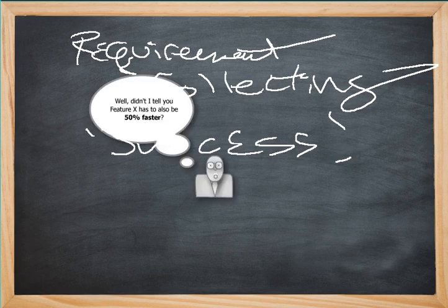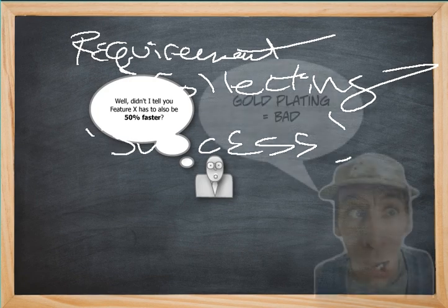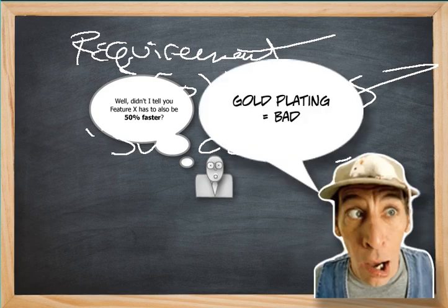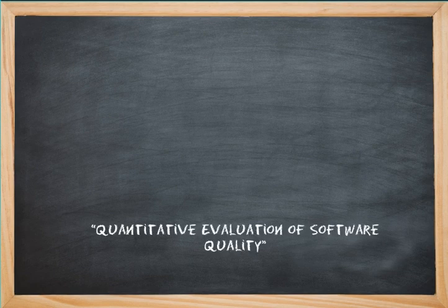phase of a project. And of course, there's the situation where implied requirements somehow sneak in. You've probably seen something like this, where someone in a product ownership role basically assumes that the team knew that, by the way, this particular feature needed to run 50% faster or something like that. This is commonly known as gold plating. It's never a good thing to take place on a project that's schedule bound.